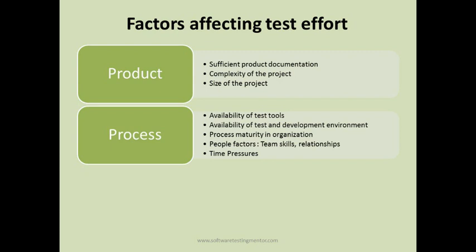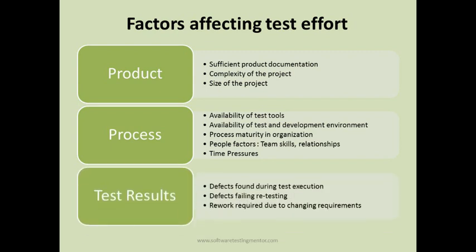Time factors also affect test effort. Test results play a role too — if many defects are found during test execution, it extends the test cycle, since defects are being fixed and retested repeatedly, increasing effort. Additionally, any rework required due to changing or unclear requirements means the development team's changes must be retested, which further increases the test effort required.